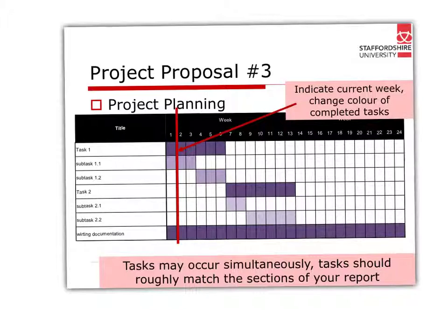So sometimes your implementation can actually start before the other one's finished, because you're talking about the general things. Maybe the actual algorithms that you're going to implement can't be decided, but the hardware part or the simulation platform can be investigated before the overall literature review is finished. And it's all about working smart and not leaving your implementation too late. Starting it as early as you can.